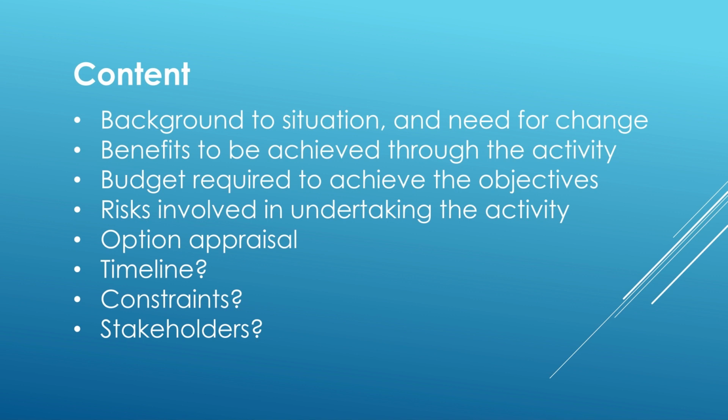What are the risks involved in actually undertaking the activity itself? So again, are we going to fundamentally impact our business by running this project? If we pull everybody off of the main line in order to do this project, what happens to those business as usual activities? The business case gets us to focus on different ways we potentially can achieve that same outcome, that same change, those same benefits. So we are considering like for like and comparing our options in a quantitative way to make decisions on the best way forward.